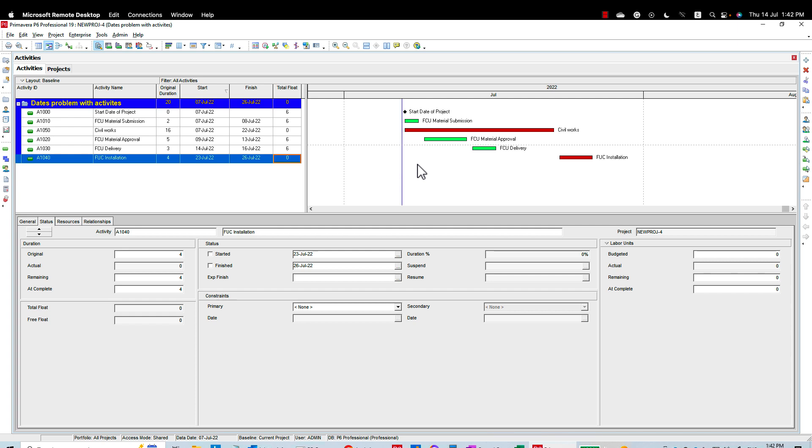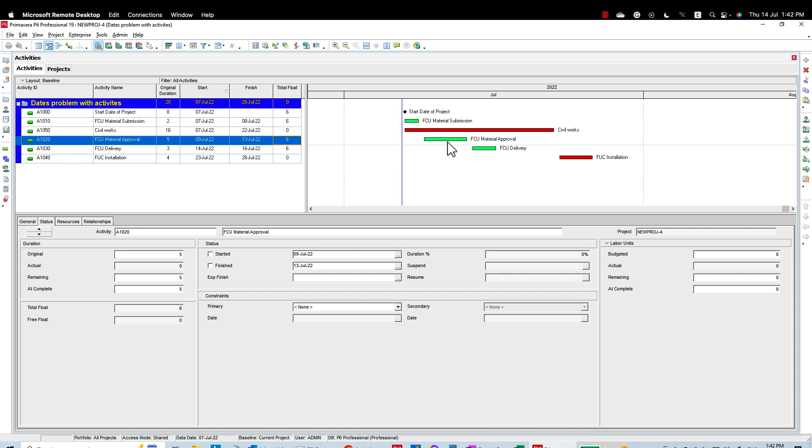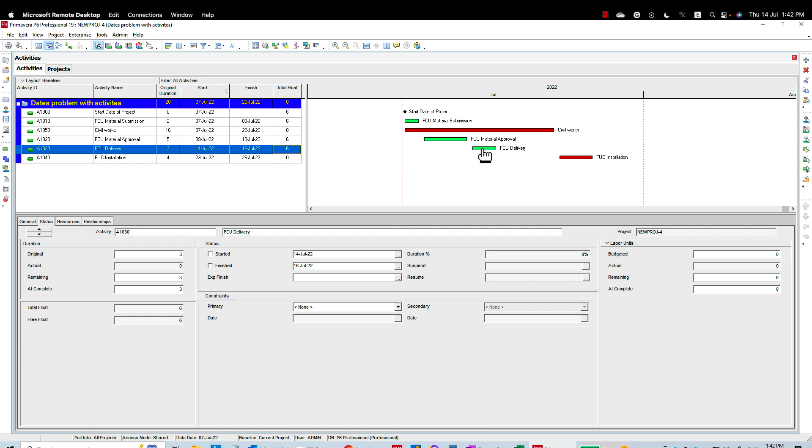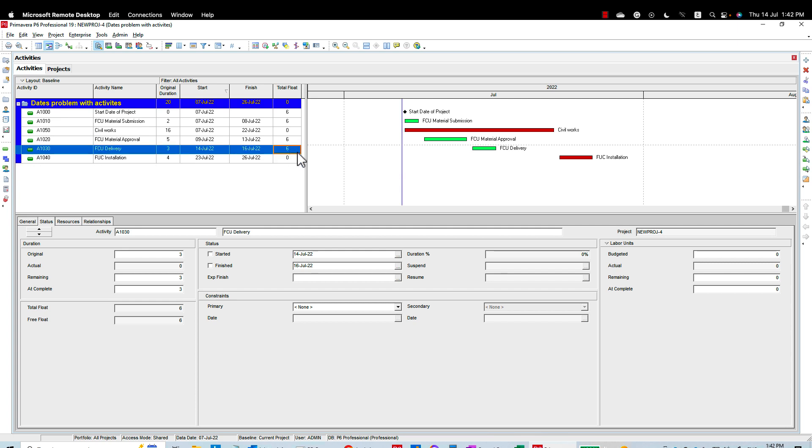So the question was, okay, I have FCU material submitted, then I have the FCU material approval, then I have the delivery. These durations are given by the procurement department. However, the FCU installation will start at a later date, so here I have something like six days float. Of course, this six days could be 60 or could be 100, 200, whatever. So what is the scenario to make my total float or the delivery date of the material just suitable or just on time as per the site requirements?